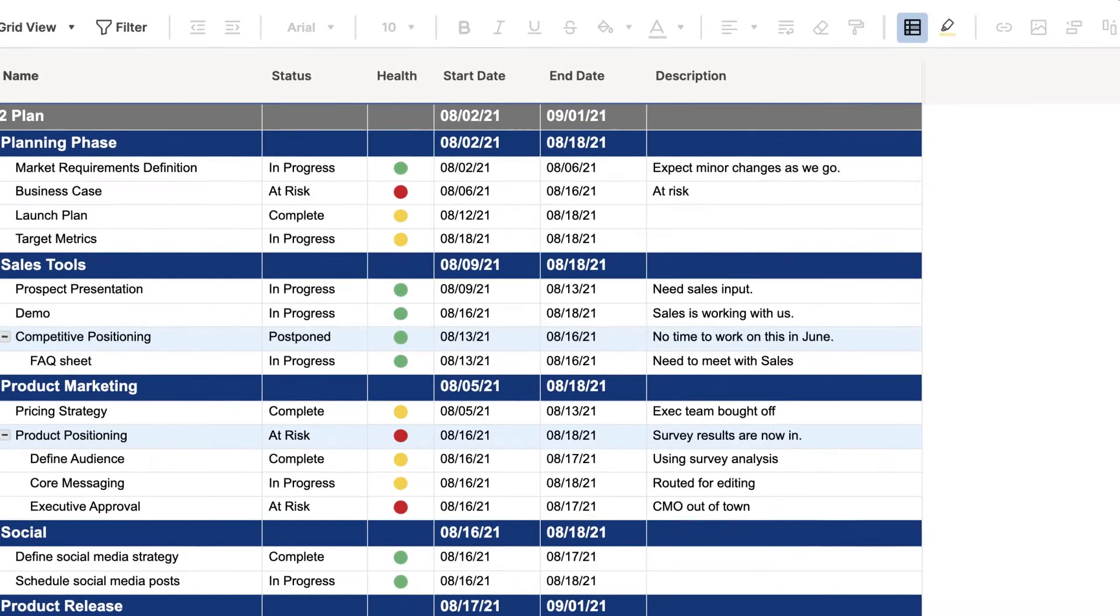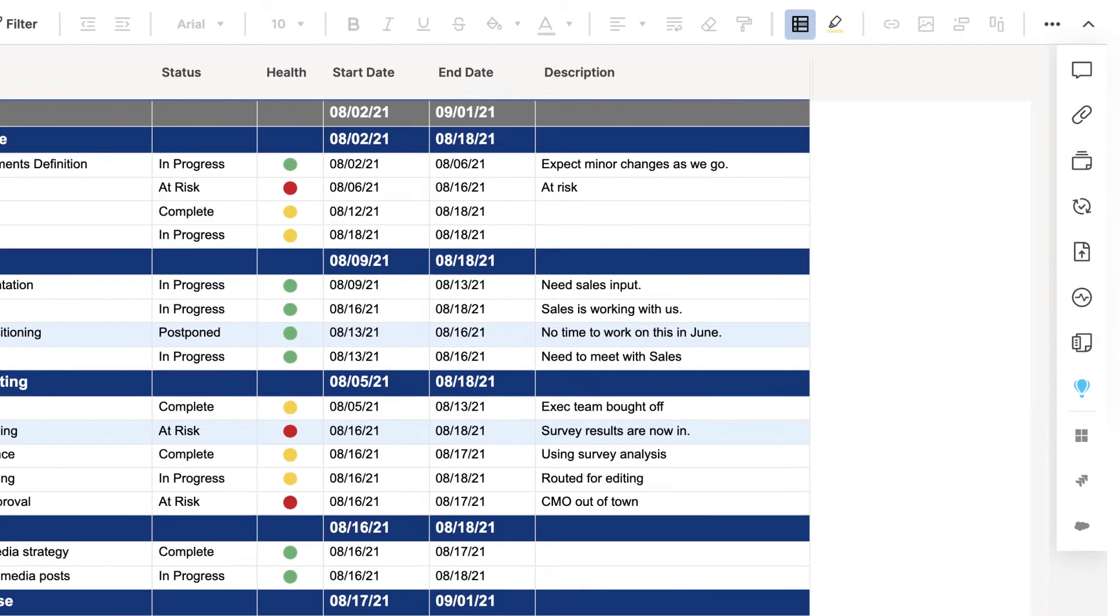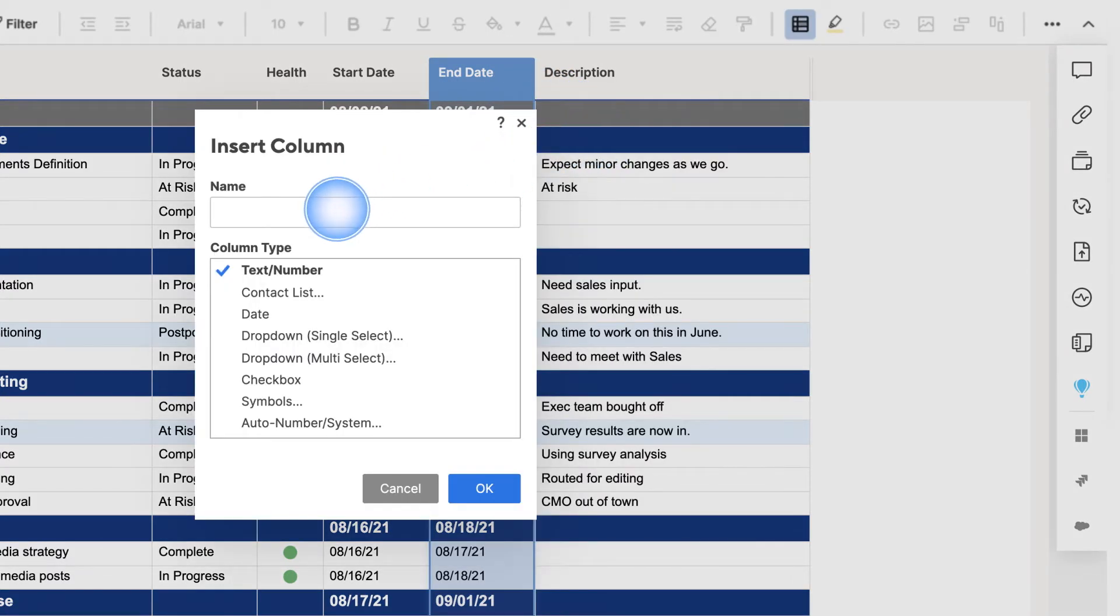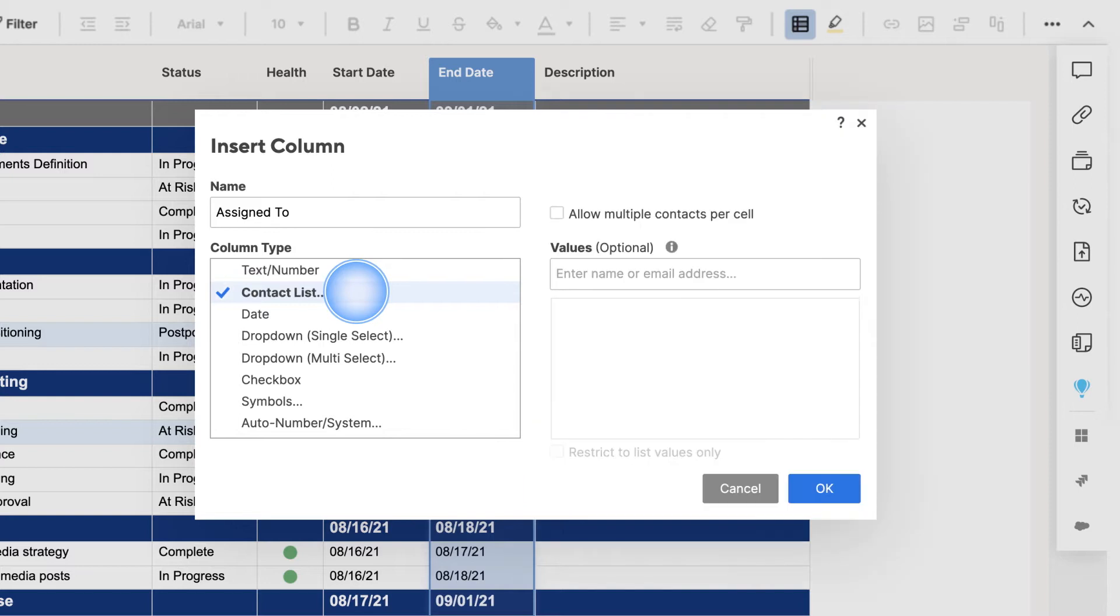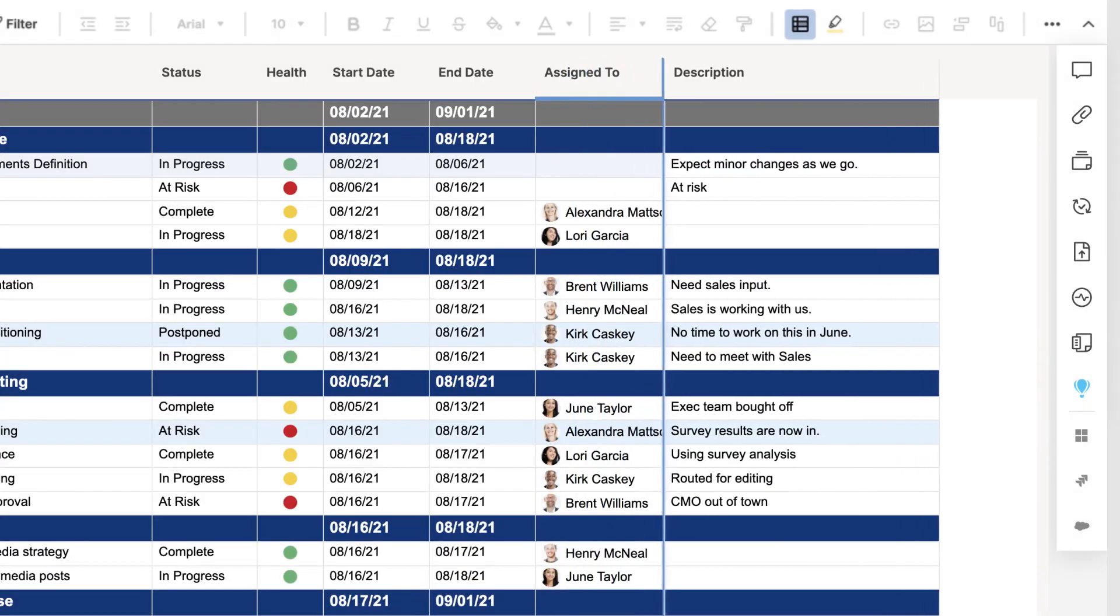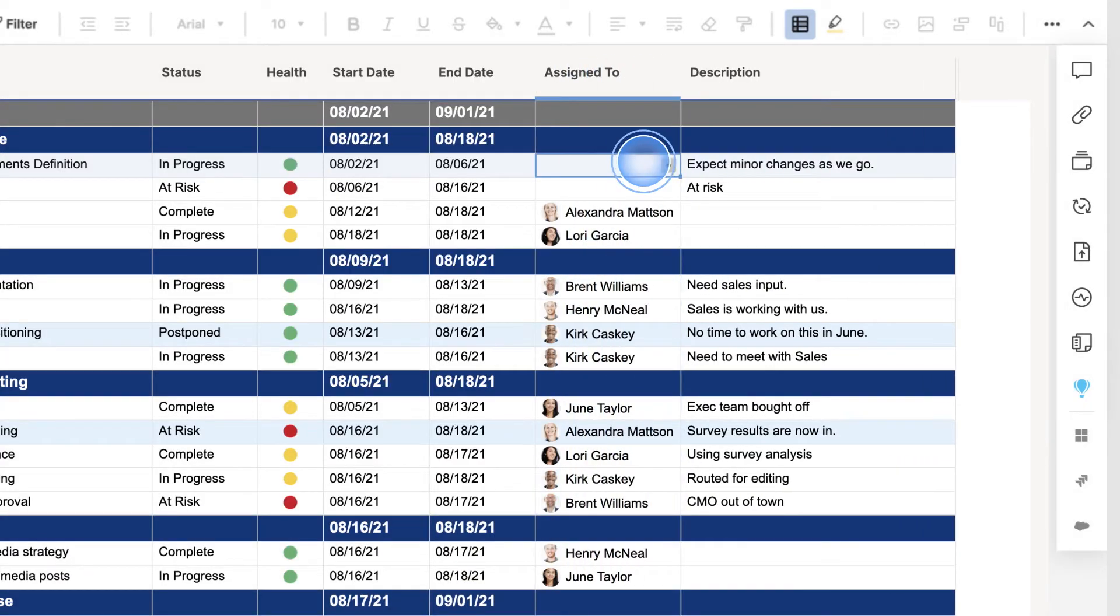To use contacts to assign tasks, add a contact list column type to your sheet. Contact list column types will automatically recognize names in both of your contact lists and pull in the full contact information including the associated email address.